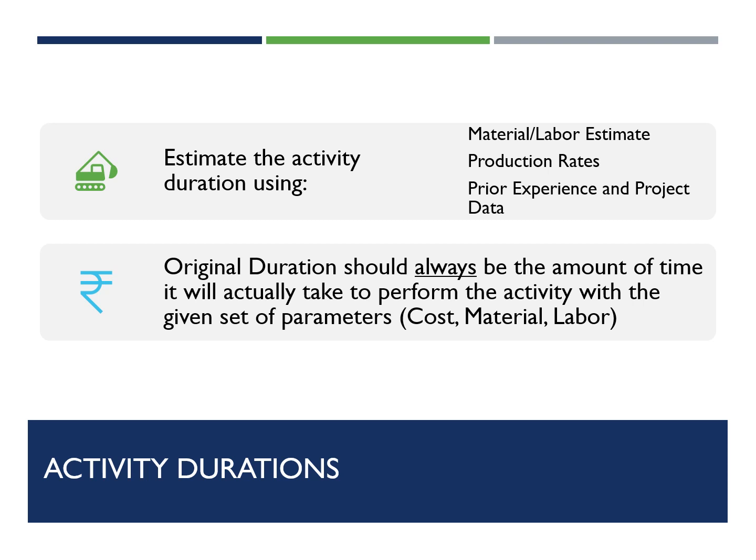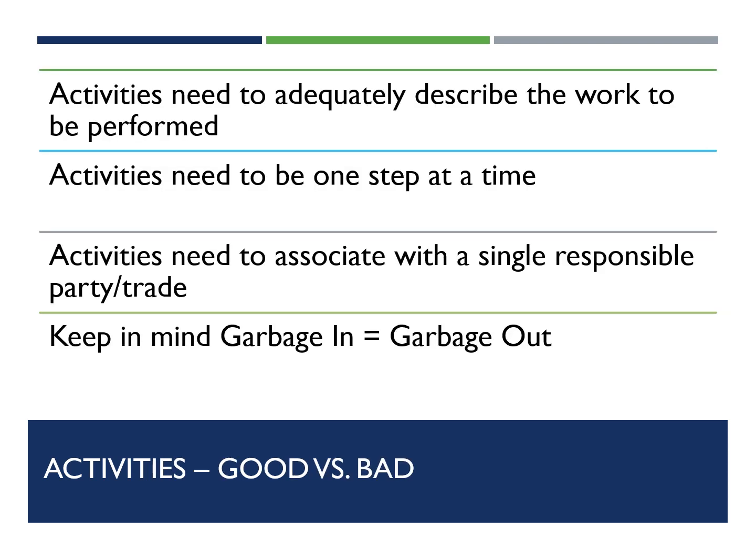If you are building your activities with a contingency amount of time in them, or making your activities longer than they're supposed to be, you could get hit with sequestering float, and that's never a good thing. So let's talk about good activities versus bad activities.